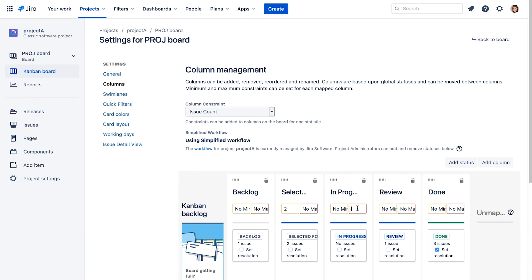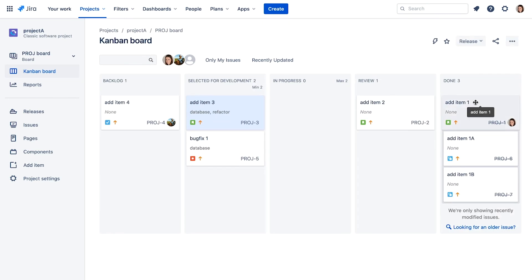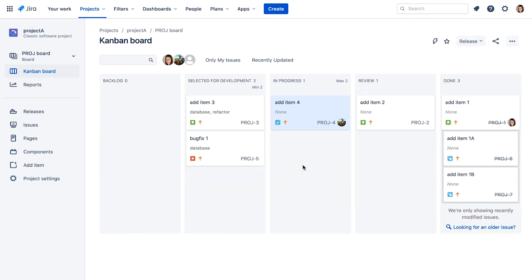Now, let's add a work in progress limit for the in progress column, but this time we'll set a maximum limit of two issues. When we return to the board, we see that two issues at most are allowed in the in progress column, otherwise the column will be highlighted.